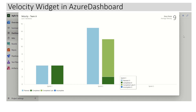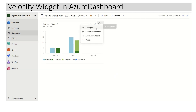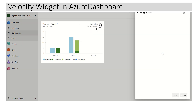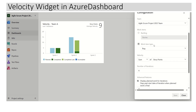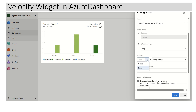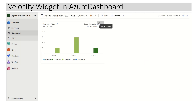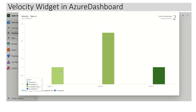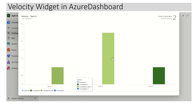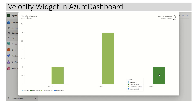This is the average velocity and we can always use this number. If this particular team is also working on bugs apart from user stories and we want to understand the bug velocity, we can select the work item type as Bug, and just look at the count of work items. If we expand it, we can see the number of bugs or defects this team has closed: in Sprint 1 it closed 1, in Sprint 2 it closed 3, and in the current ongoing sprint it has already completed one item.